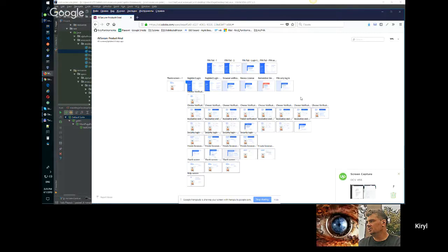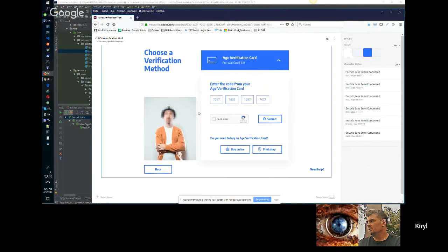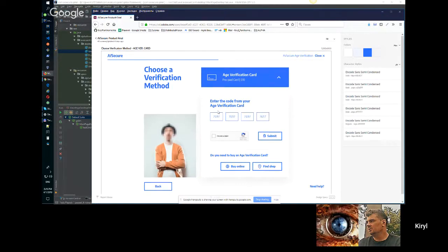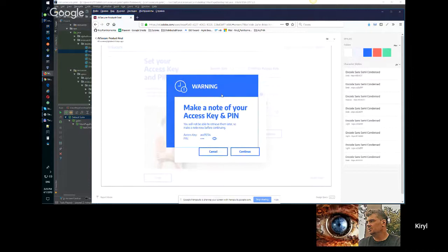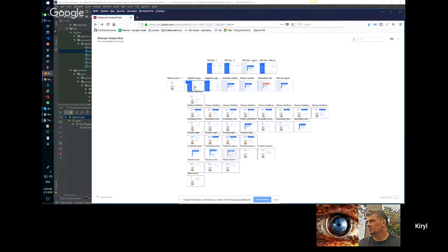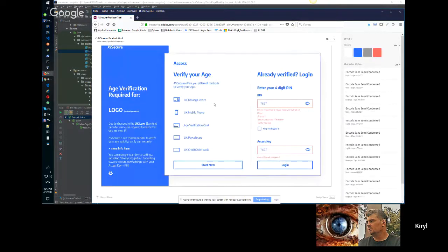So you said that every page for UI testing will take you 1 hour. Not less than 1 hour. For example, this page will take half an hour, but some pages could take an hour and a half. This page is also very simple. Some text blocks, some buttons, and 2 functionalities. Yes, but the pages which will take the most time are the main pages here. And probably the page where you need to define how to log in and so on. Okay, I understand. So it's 100 hours, the time you need.